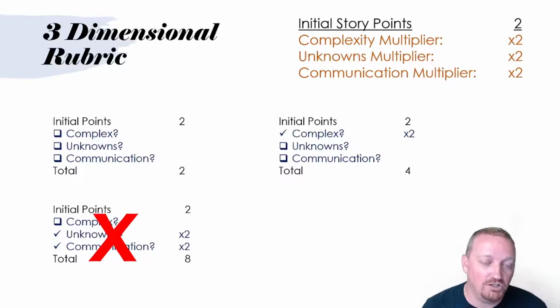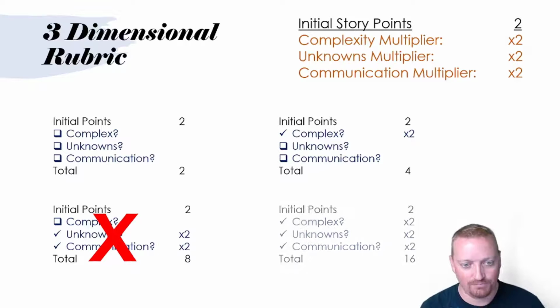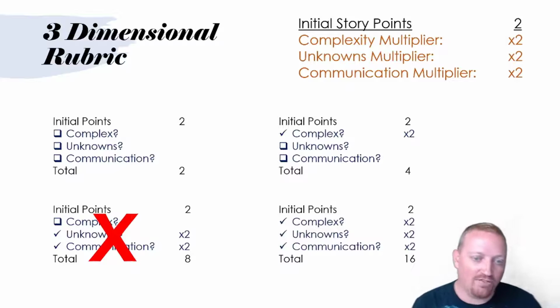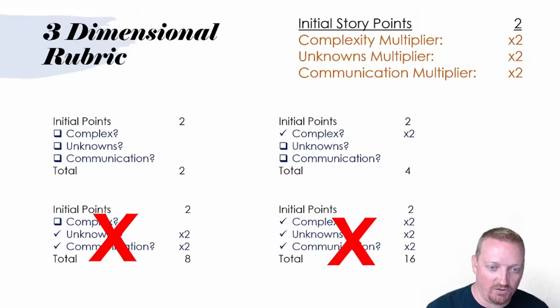And I'm going to be talking a little bit about that here in the upcoming slides about how you resolve each one of these. But just know that if you get to a point where 2 or more of those dimensions are going to be challenges, then you probably shouldn't be doing that story until you resolve those challenges. So again, if all 3 of these different dimensions of difficulty exist, you really, really should not be doing them.